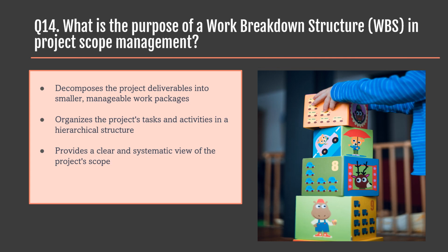In our case study for Level 1, Mary defined the project phases like initiation, planning, execution, monitoring, and closure. In Level 2, the major deliverables were jotted down like the market research and requirement gathering, app development, integration, testing, and deployment. In Level 3, specific tasks were explained.